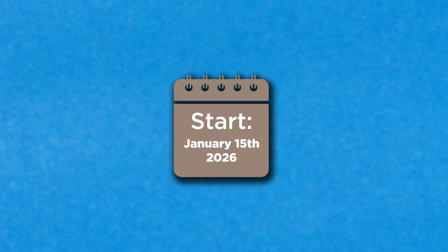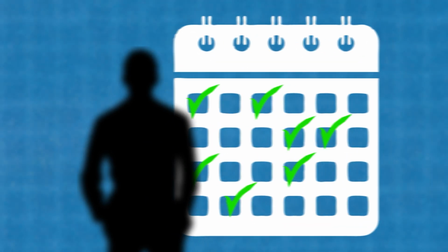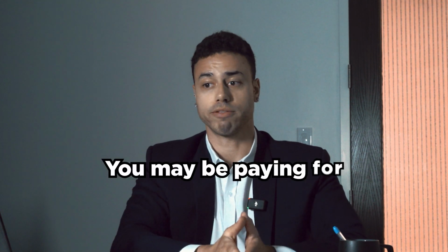That's a perfect segue into the next thing you want to see on a schedule, which is a start and end date. Your project should have a start date, when they're saying this is the day we're going to start, and it should have an end date. This allows you as a client to plan accordingly. If you have to train staff before your location opens, most people want to train staff for about a month. But you need to know that you're going to have a set end date, and then after a month, those staff are going to be working inside the location. If that end date drags on, you have no idea when to hire the staff or when to have them training, and you may be paying for 2 months of training when they only needed 1 month. And then you don't want to get into firing people, all that kind of mess.